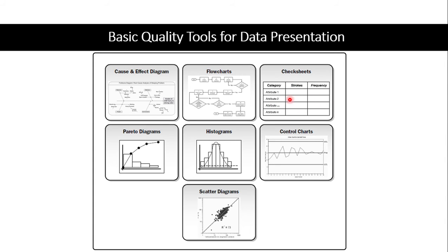Check sheets give you a checklist. With check sheets, if you have a number of bugs, you try to take the frequency of the bugs, for Monday, Tuesday, Wednesday, Thursday, Friday, or for the first week, second week, third week, the number of bugs that you have detected, so that you can have a trend graph. The check sheet data will give you a trend graph. Pareto diagrams and histograms are statistical diagrams, you can Google them and see.